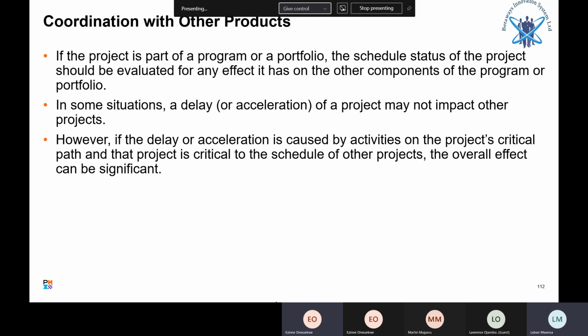And that's why we do scrum of scrums. I'm not sure whether you've heard about this. A scrum of scrums, for big projects. For big projects, you will need to do scrum of scrums in agile projects. It's normally like a sync meeting, to sync work. For example, if you've got 5 teams working on different products, you will need to sync their work.